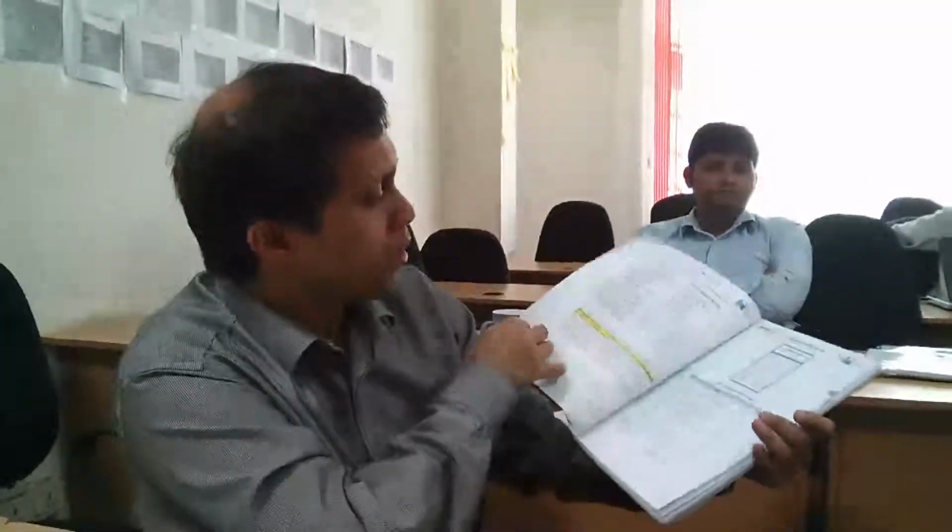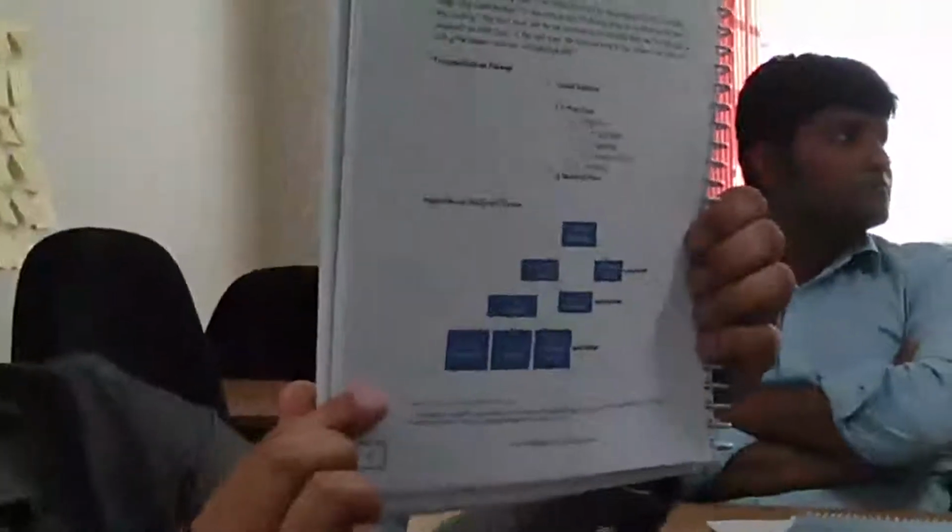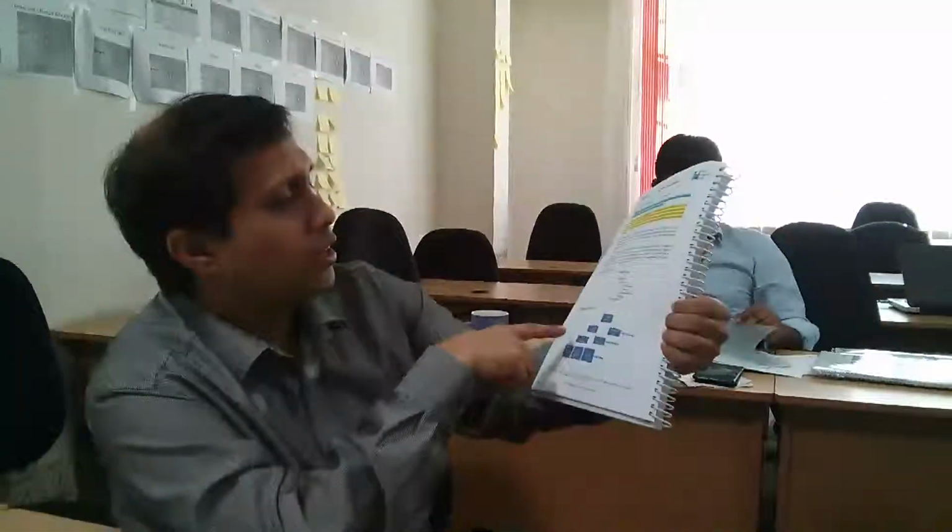Let me take you through, for example, just the diagrams to give you a feel for how this is working. If you look at this diagram on page 52, you would see that you are creating the building, then the first floor, second floor, which is the control account, then you know what a planning package is, which is electrical, plumbing, and then you know what a work package is.